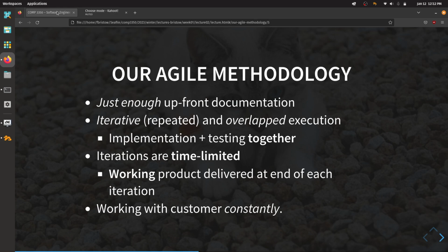If you have a very firm idea, a solid idea of what you're building, you know exactly how to build it, you know exactly what each of you are going to do, then waterfall will work perfectly. If you don't know what the door looks like, you don't know how heavy it is, or what shape it is, or how many people need to go through it at the same time, then maybe Agile is a better approach. Does that answer your question? Okay, good.